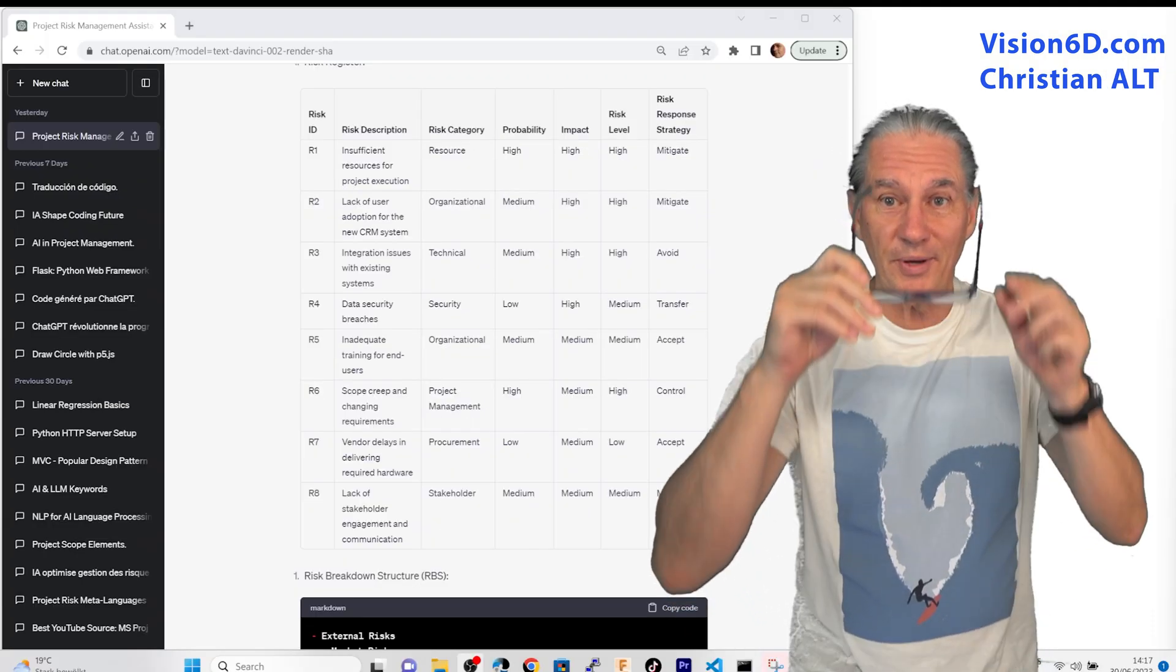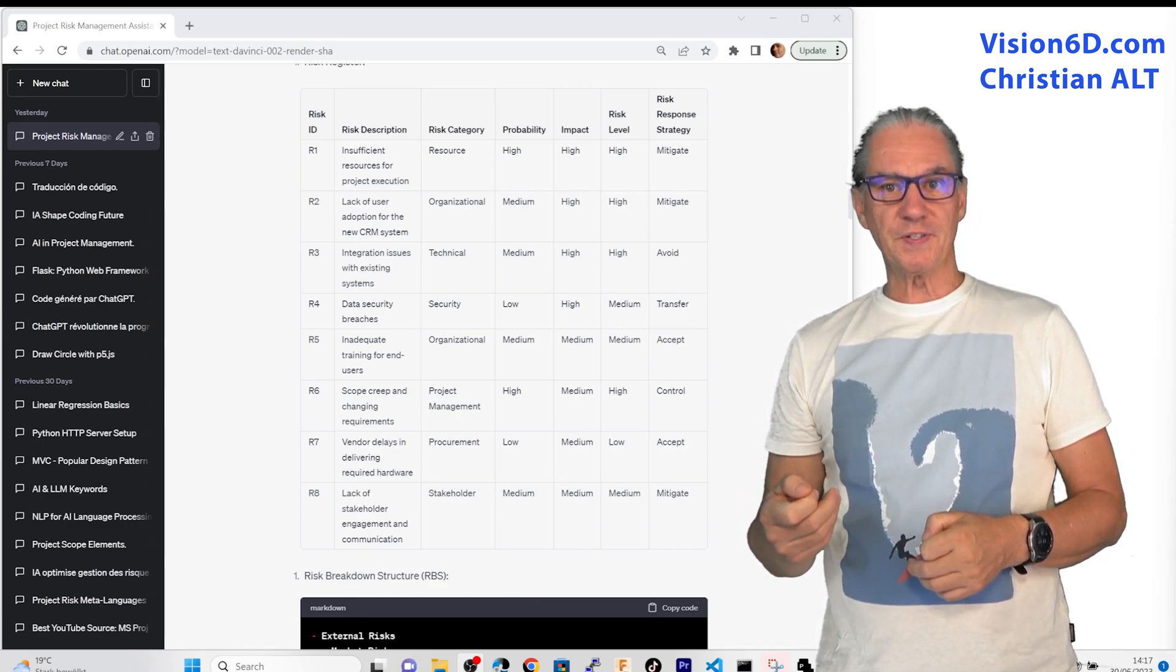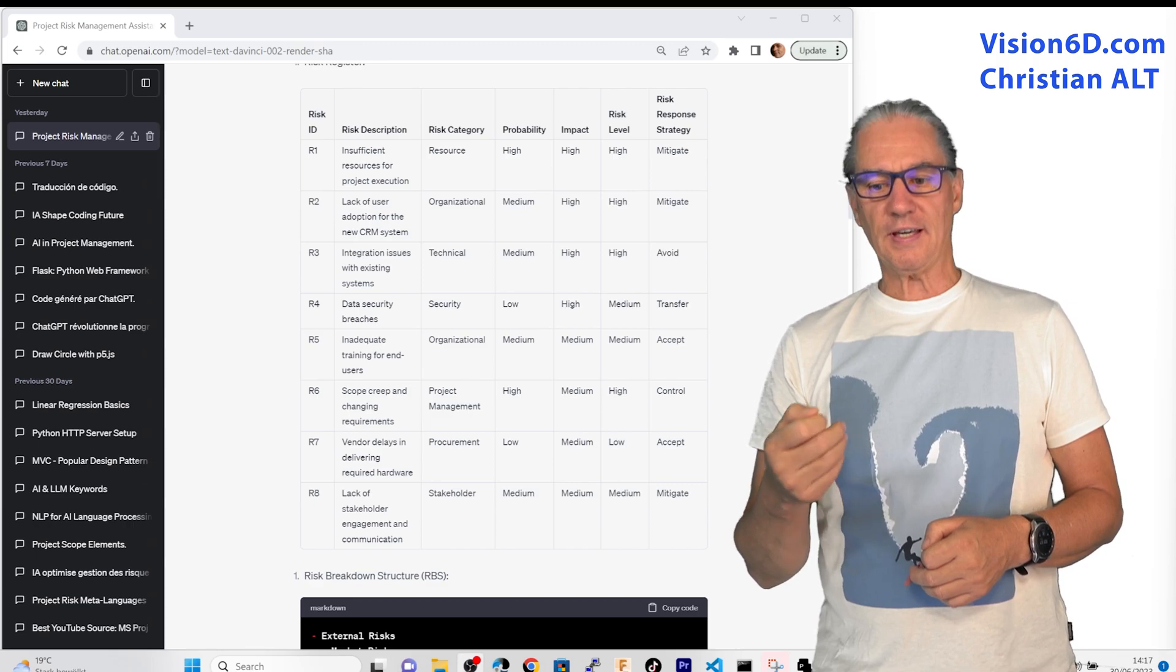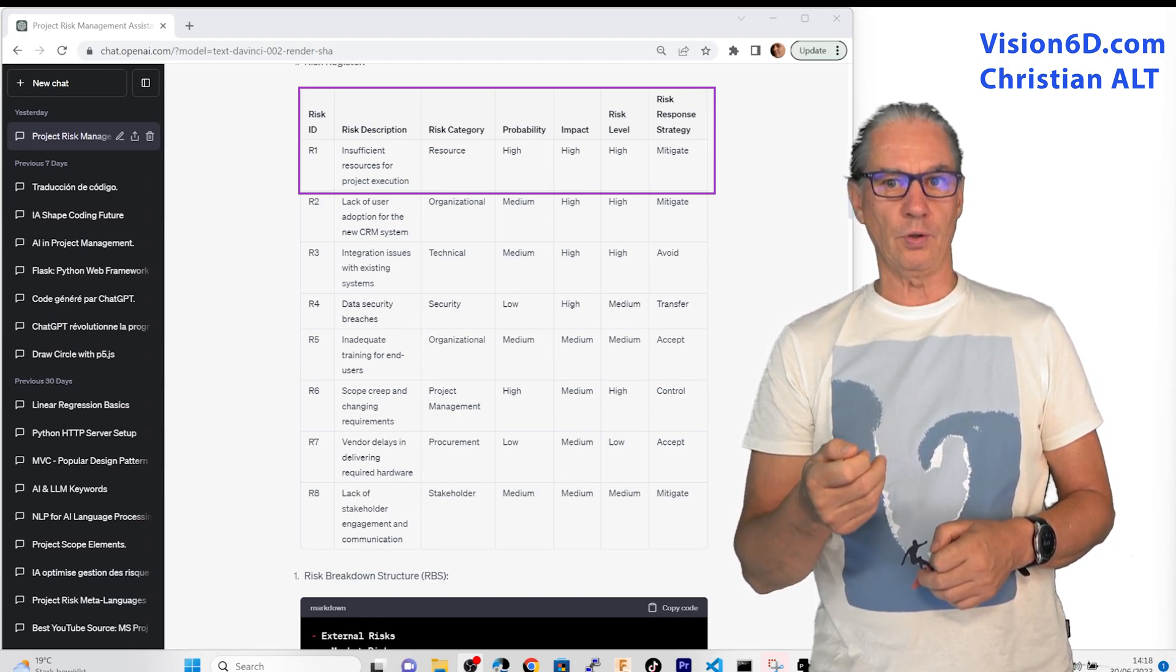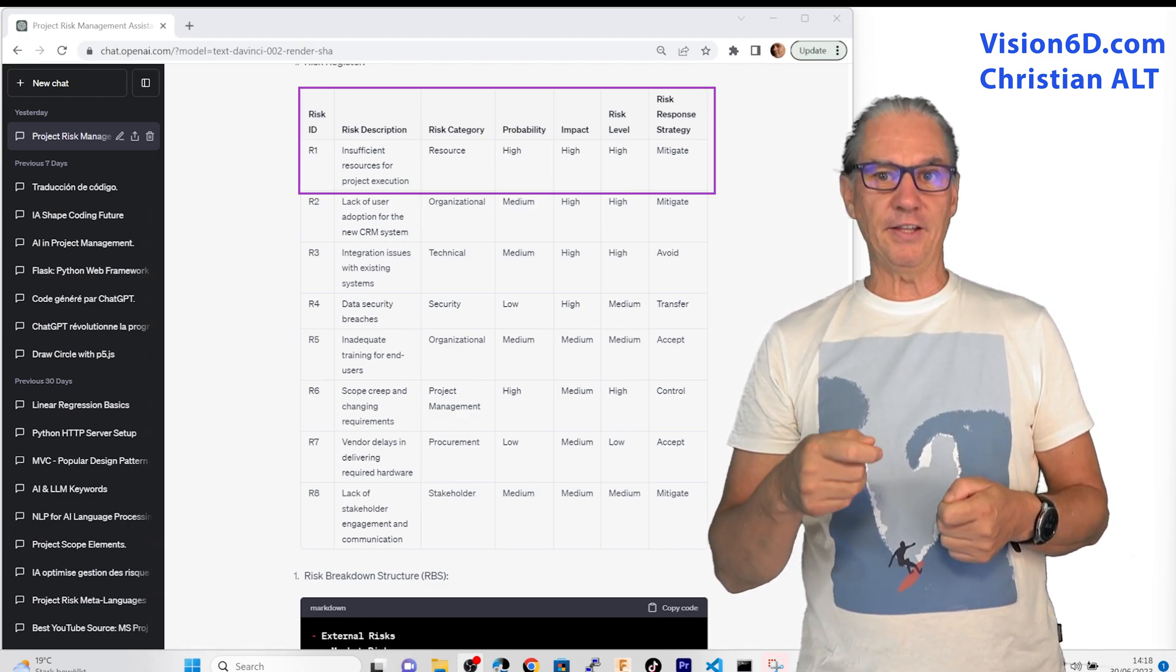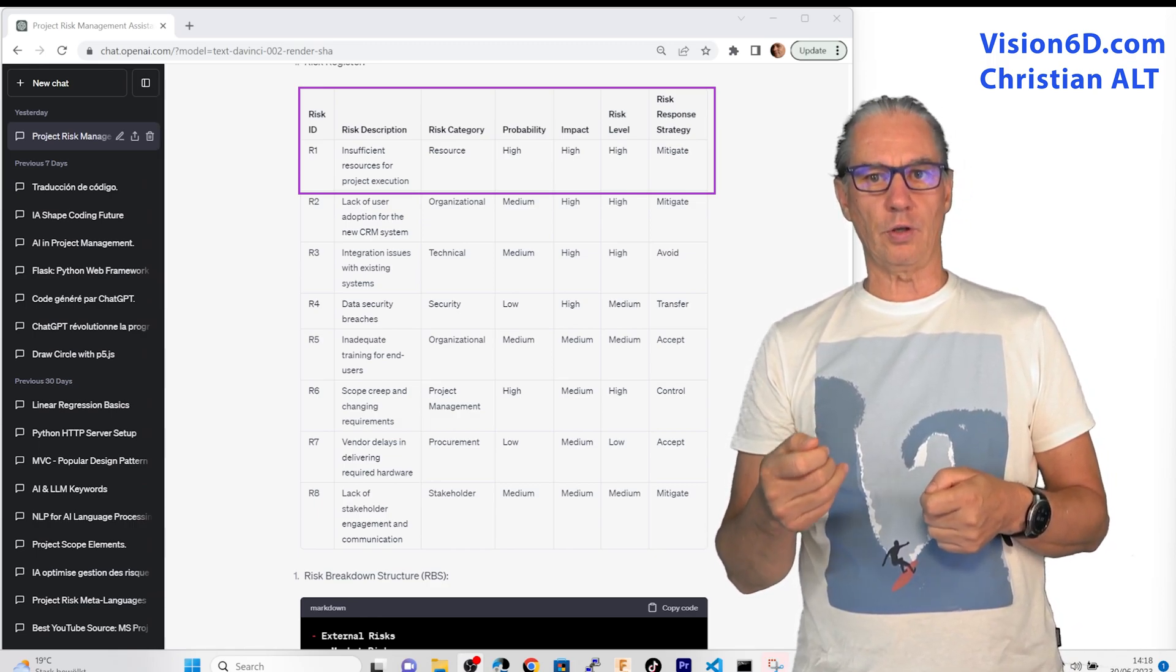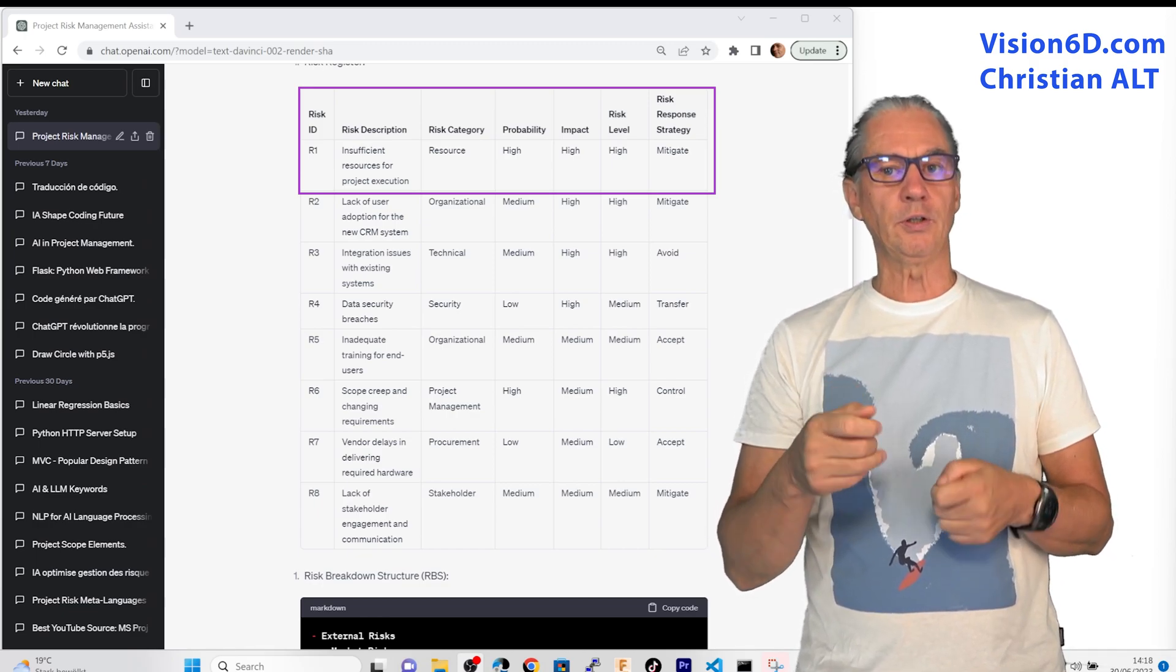Some comments now on the risk register. We see that we have received eight different risks in the table format and you see that each risk has been numbered. We have after that a risk description, a risk category. So if I take the first one it says insufficient resources for the project execution which is quite a common situation in many projects. The risk category you see its resource and the probability is high and the impact or consequence on the project will be high too. After that we have what we call the risk level which is a combination of probability and impact. You see that it is high and the risk strategy that should be here applied is really to reduce to control to mitigate this risk.